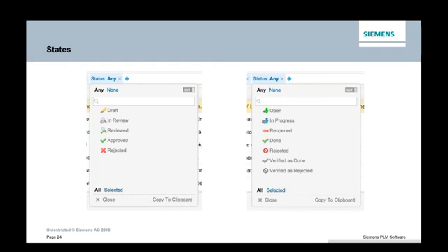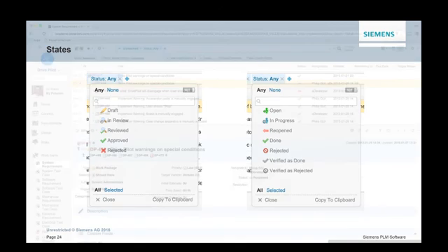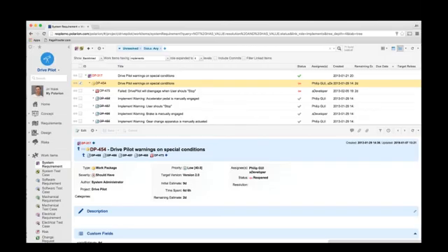I'll show later that we are more and more pushing the stateless approach as best practice, because it is also more aligned with the Agile approach. What does it really mean? If I go with a stateless approach, where do I actually track the status of the production or implementation? That's what we call a work package or high-level task, or in an Agile process, a user story. So we are introducing a new type.